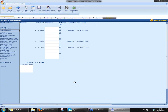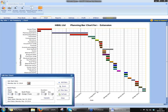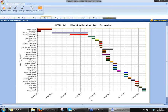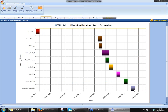I've shown you a few calculators there. So if you're happy with that guys, I would like to move on — we've only got about 20 minutes left. So what I'll do now is move on to the Gantt chart or the schedule of works. This has given me a standard planning chart for an extension. Now obviously we haven't done anywhere near that amount of estimating today. If I want to see the job as I've costed it so far, go to Remove Unused Bill Phases at the top here. The software at this stage will still double-check with you — it'll say, look, are you sure you don't want to cost these out before we get rid of them? So even at this point, the software's making sure you're not missing anything. I'm going to say yes, we don't need to cost any of that out, and it's given me now a true timeline as to the work we're going to be doing.